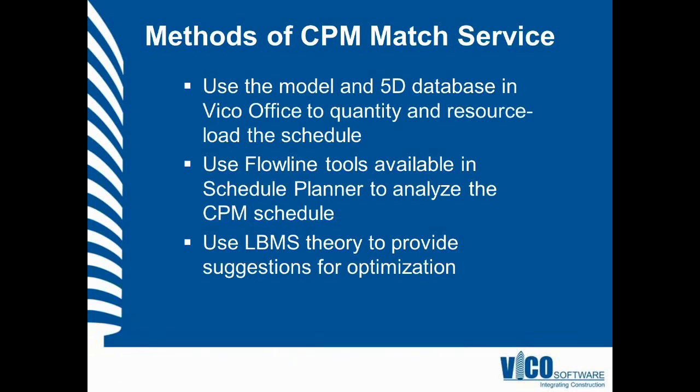So just to recap some of the methods of the CPM match service and the differences between the methodologies of CPM scheduling and location-based scheduling, really what we're doing as part of the step-by-step comparison is using the models, if they're available, to quantify the amount of work in each location and to calculate the resource requirements for installation by location. Effectively, quantity and resource loading your schedule from data that you may actually have in Vico Office already, or you may have easily available from other members of the project team.